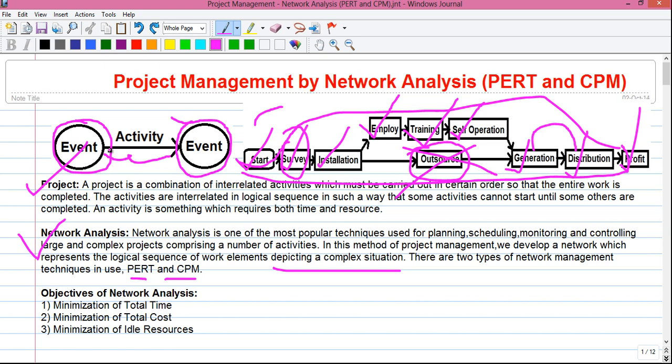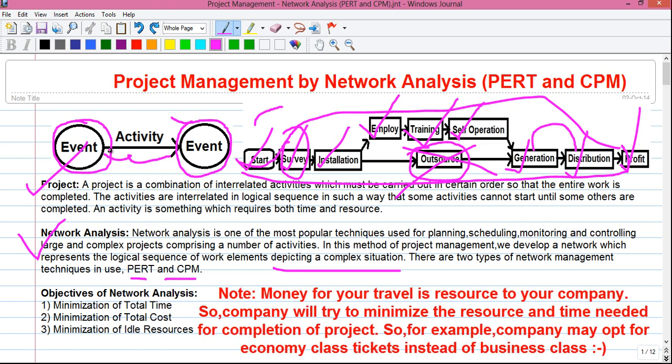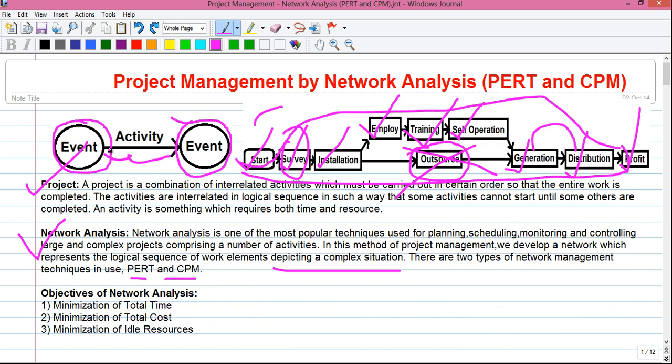An activity consumes both time — you need some time to travel from New York to London — and resource — you need transportation facilities for your journey. Also, you yourself are a resource to the company for the project, because without your labor the project cannot be started. The event of starting the journey and the event of ending the journey do not consume any time or resource.